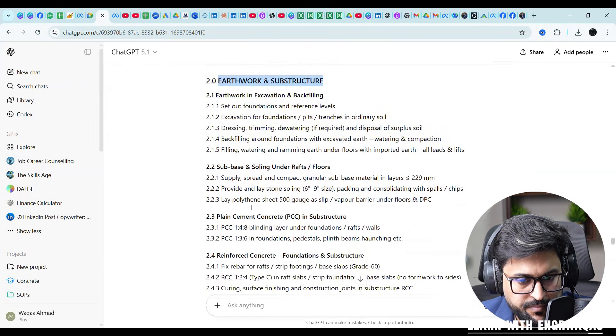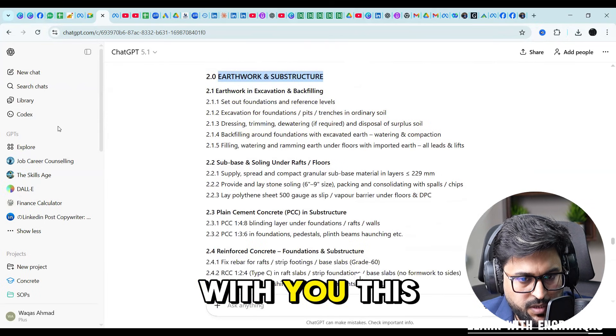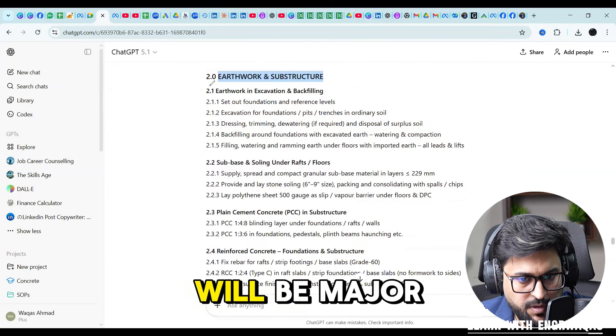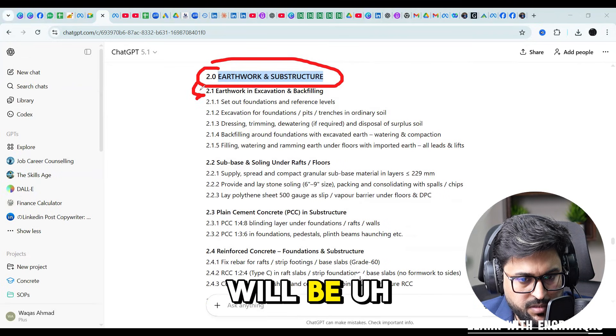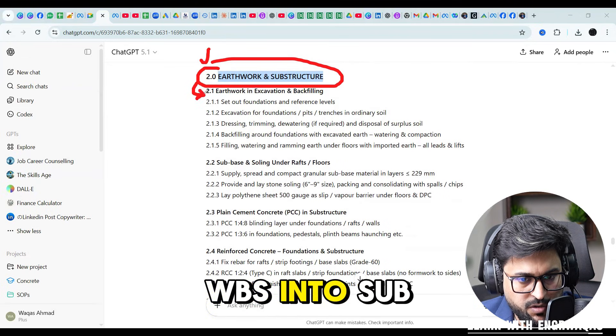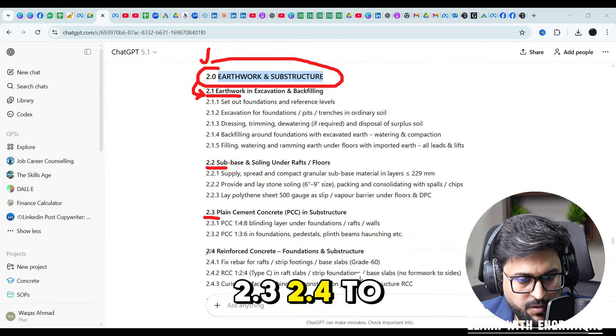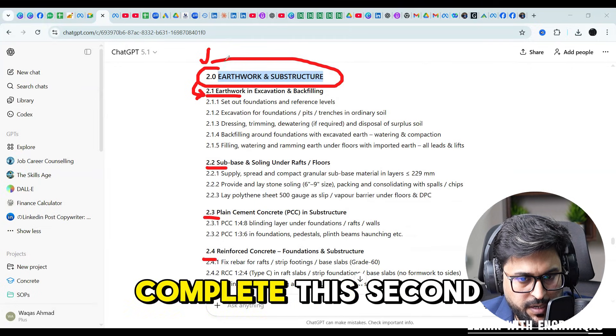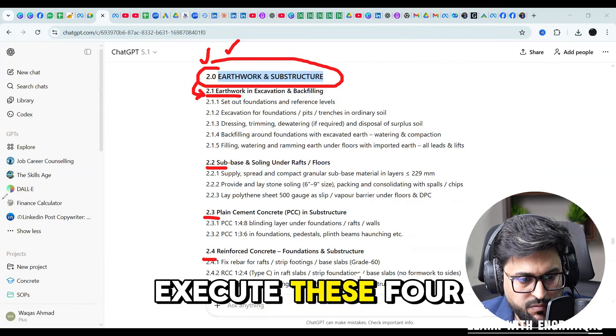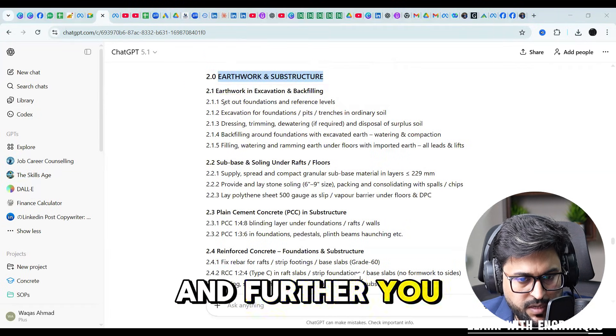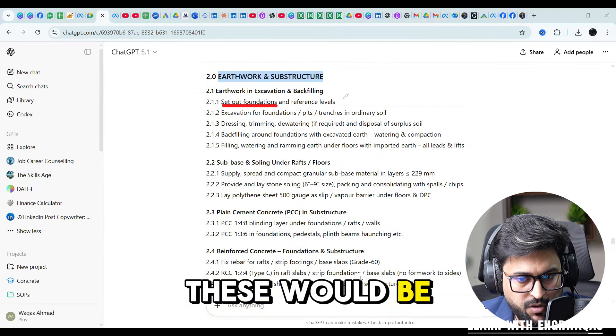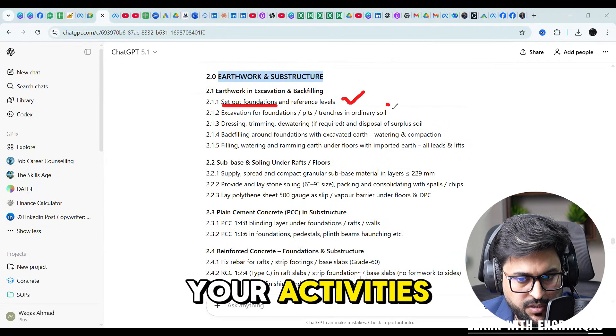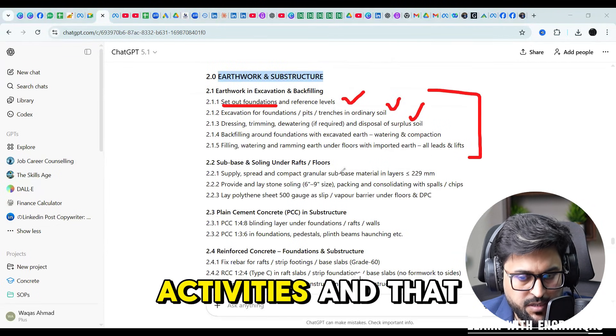This will be major WBS and this will be division of that WBS into sub components: 2.1, 2.2, 2.3, 2.4. To complete this second WBS you have to execute these four sub WBS. Further you can see, set out, from these would be your activities. These will be activities.